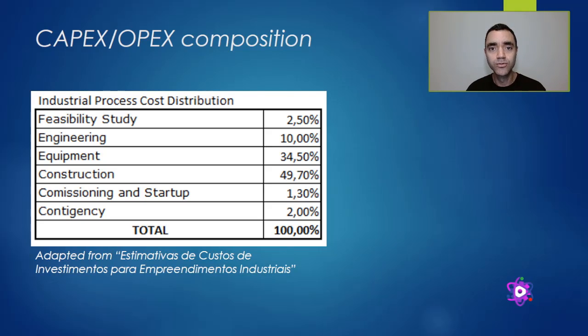So this is another way to do cost estimation from scratch, if you have at least the information of the equipment. In the example, the only reliable information that I have there, let's say, is the quotation of the equipment. I had a quotation of a rotating machine, a two-stage compressor, similar to the conditions that I want.